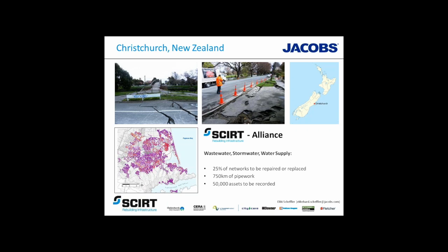It makes up about 25% of the networks that need to be repaired and replaced over the time of SCIRT. About 750 kilometers of pipework, and we are estimating about 50,000 assets to be recorded that are being reconstructed or repaired over the time of SCIRT.